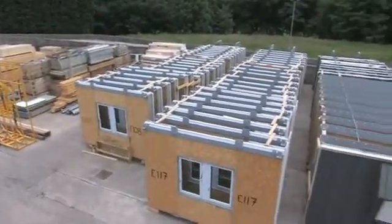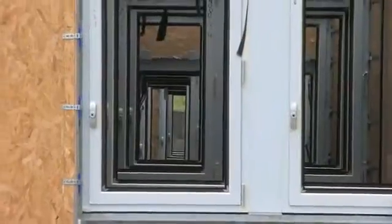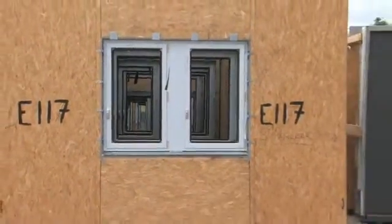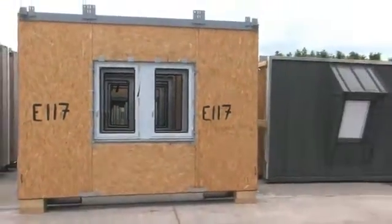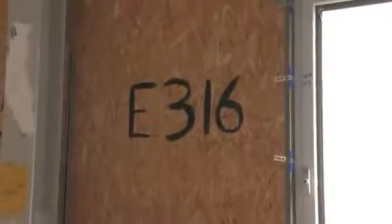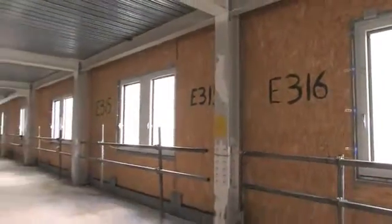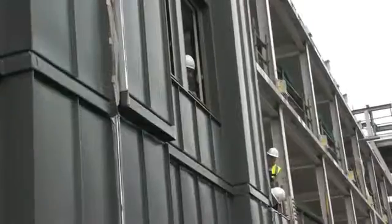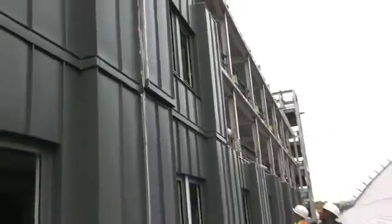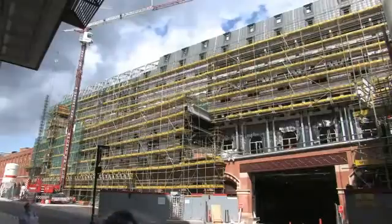Transport to site using a low loader vehicle enabled the vertical stacking of the wall panels at the factory to be replicated during transport, thus avoiding double handling and providing an opportunity for the client to inspect the panels prior to installation. The wall panel delivery phasing was linked closely with the planned progress of installation works and enabled the installation of one wall panel every 30 minutes, around 6 times faster than traditional methods of insulated wall construction.